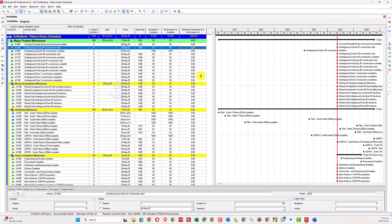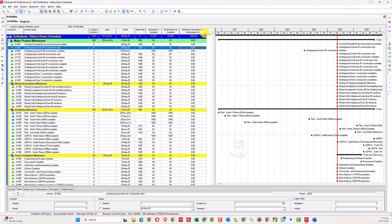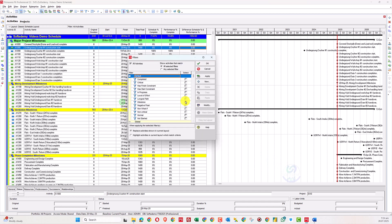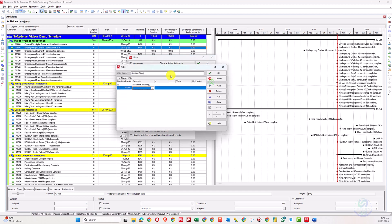You can do this for labor, non-labor, and everything. Apply, commit changes, say No, press OK. Now we have to filter out the activities where performance and schedule percent complete are not equal. The next step is to create a filter.